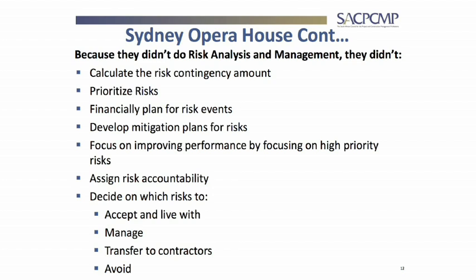So people will always say, yeah, but we've got a budget. It's got a bit of contingency, it's got a bit of growth, you know, if there's scope creep or something. But it's still not a risk contingency, which means to me, and this is the terminology I use, it's a P0 cost. It has no contingency for if anything goes wrong down the line. It also doesn't have any contingency if I need to mitigate something, if I need to pay for a mitigation. For example, how do we pay for a mitigation?